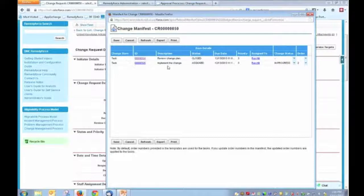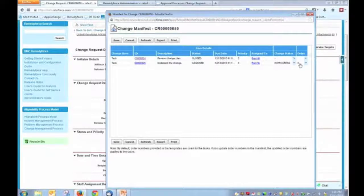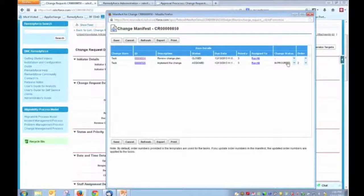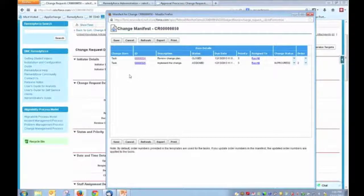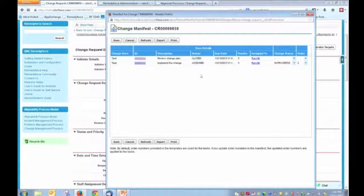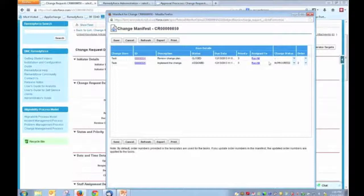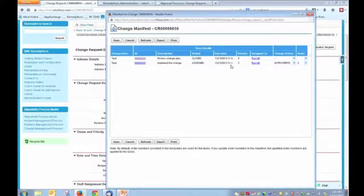So in this case, when we have implement change, a task for implementing the change, that is the second item to be executed, but it will also change the status of the change record to in progress. And so this is certainly a rudimentary form of a Gantt chart, if you will, because this allows us to identify the task, to identify the status or the change stage that we're in with that particular change. So the change manifest is something, when you talk about planning a change, that certainly should be utilized.